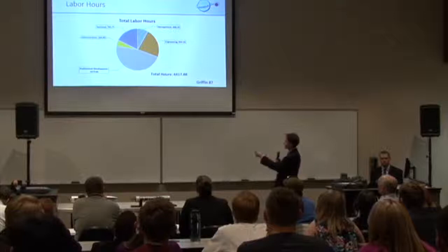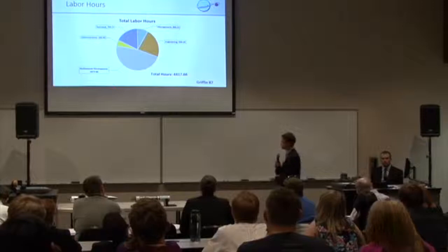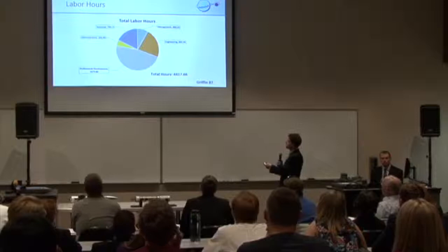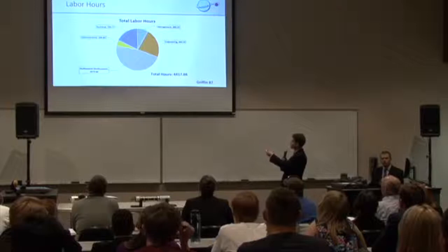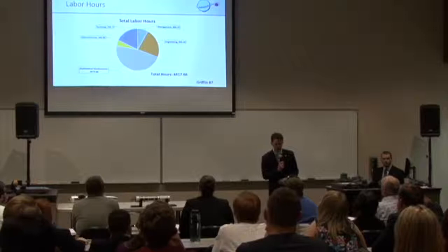professional development, 2,075 hours, approximately 45% of all the time that we spent starting from September 22nd of last year. That is time that we spent in class working on this project. The other four categories are time spent outside of class working on the project. Most notably, engineering, which is time spent individually, and technical, time spent working in groups of two or more. Management is the section that is only contributed by myself and Dania Bluejuice as the assistant project manager. Administration is time spent editing documents and preparing presentations such as this one.